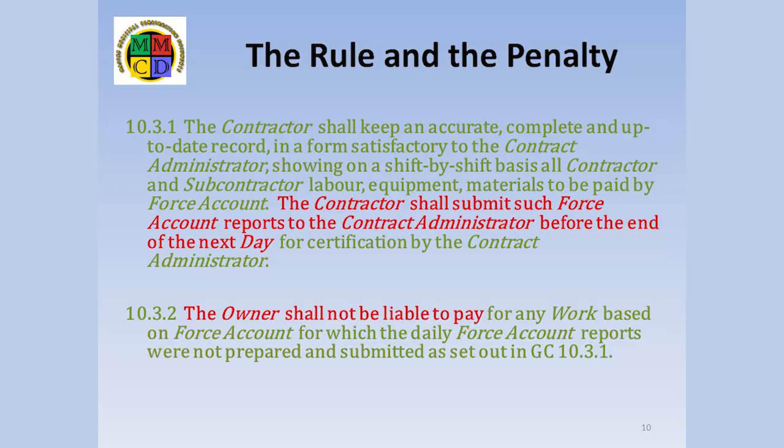GC 10.3.1 is very explicit. The contractor shall submit such force account reports to the contract administrator before the end of the next day. The word shall makes this a mandatory obligation for the contractor to provide the forms on a daily basis when doing such work. While not saying it directly, there is an implication that the CA is expected to certify the forms on the same frequency.